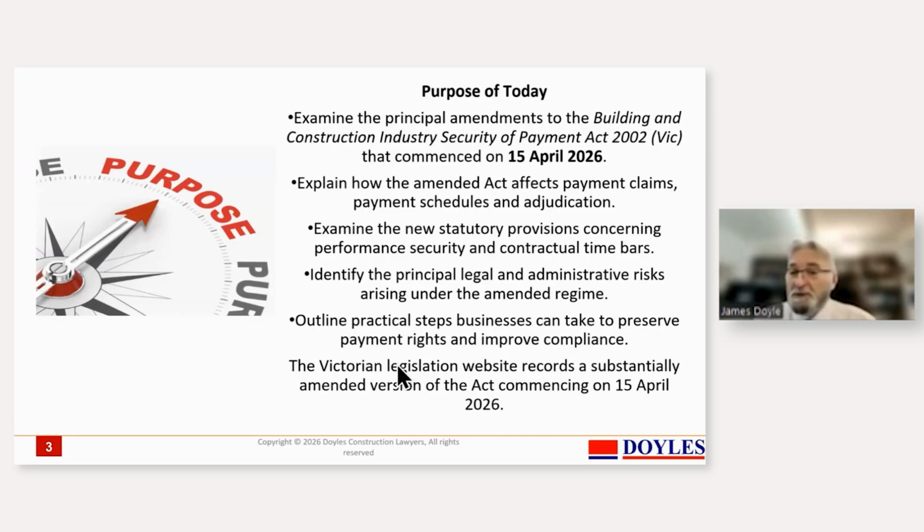The situation is before that, the Victorian Act, from an Australian perspective, fell behind what the other states were allowing for a contractor. Fundamentally, if we use New South Wales as a benchmark, New South Wales let you claim a lot more things than the Victorians. The Victorian Act, previously to these changes, said that if you had a contested variation, fundamentally you couldn't claim it. And there are other restrictions on you claiming. Those have now been released, and there's an expanded role for this to play.